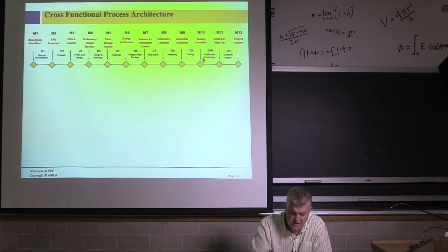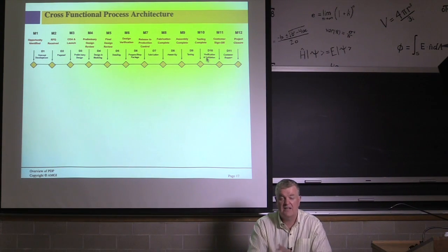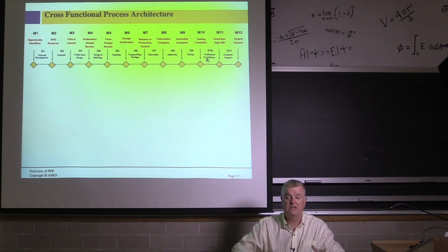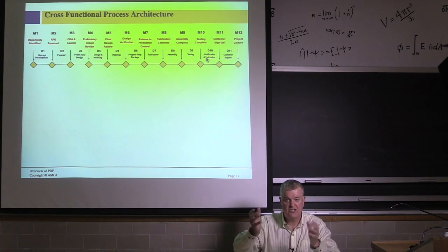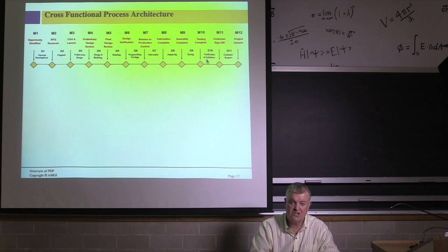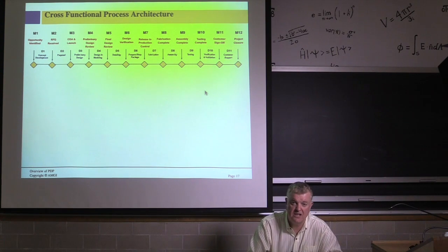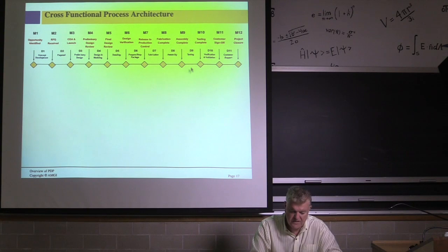So then you verify and you validate. After you test it, testing is complete. You validate and verify, it's good to go. It's run its cycles. It's robust, it's not failing, right? You can take it apart or major components of it and ship it and be satisfied that when it gets to the customer site, you can then rebuild it for commissioning, it's called. You can then reassemble a machine 98% certain it's going to function fine because of this validation work here.